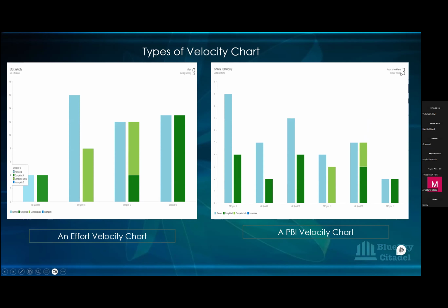But like I said earlier when I was explaining, your velocity chart won't know that maybe you don't have a full team when you're working, which will be one of the reasons. I'm not saying that is the reason, but it might be one of the reasons you have the late completion. But you, the Scrum Master that knows that, would ensure that we don't plan this much if we don't have full capacity.